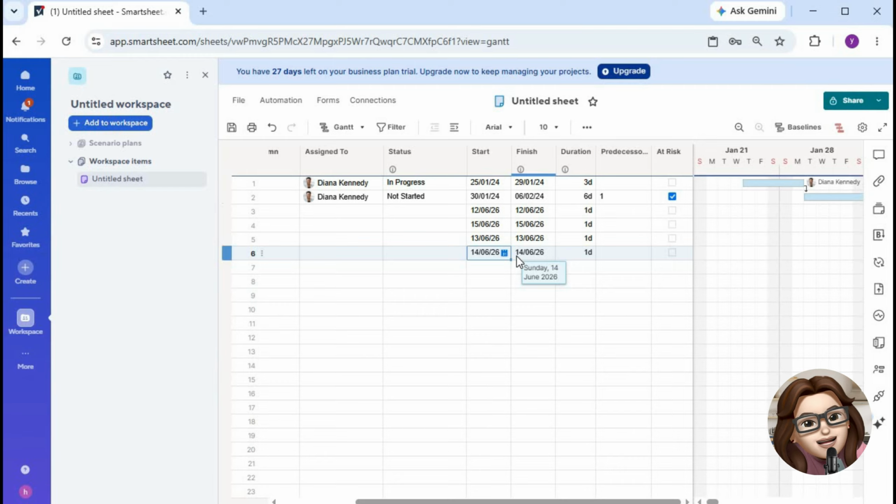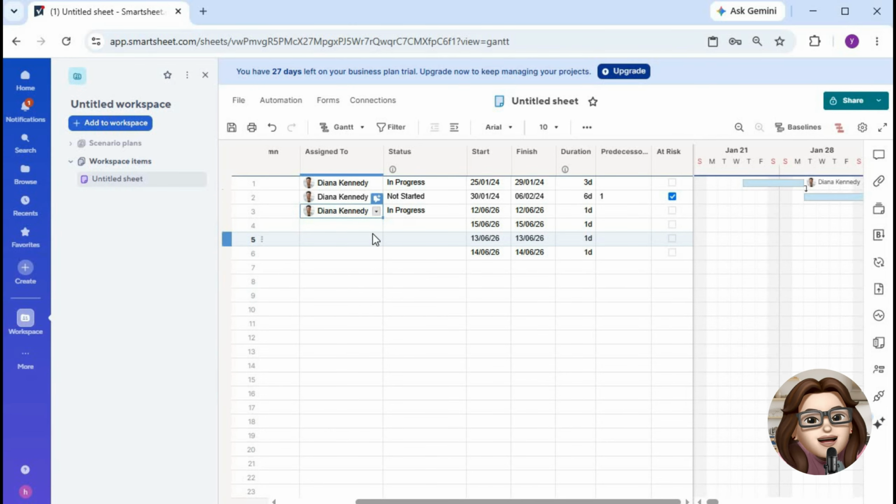If needed, you can also create dependencies between tasks and milestones to show how project activities lead up to important checkpoints. Review your Gantt chart to ensure all milestones appear in the correct locations and accurately represent your project's key events. Milestones help stakeholders quickly identify major achievements, deadlines, and project goals without reviewing every task in the schedule.